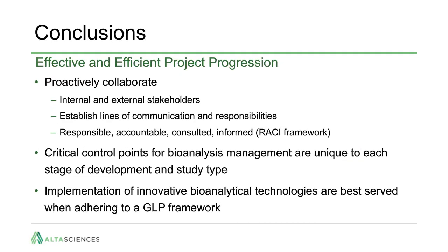So some concluding thoughts. Effective and efficient bioanalytical project progression requires proactive collaboration between internal and external stakeholders. The lines of communication and responsibilities need to be established. For GLP studies, efforts should be made to capture the information in the protocol. For clinical programs, the RACI framework is useful to identify who is responsible, who's accountable, who's consulted and informed for the bioanalytical component of the study or program.